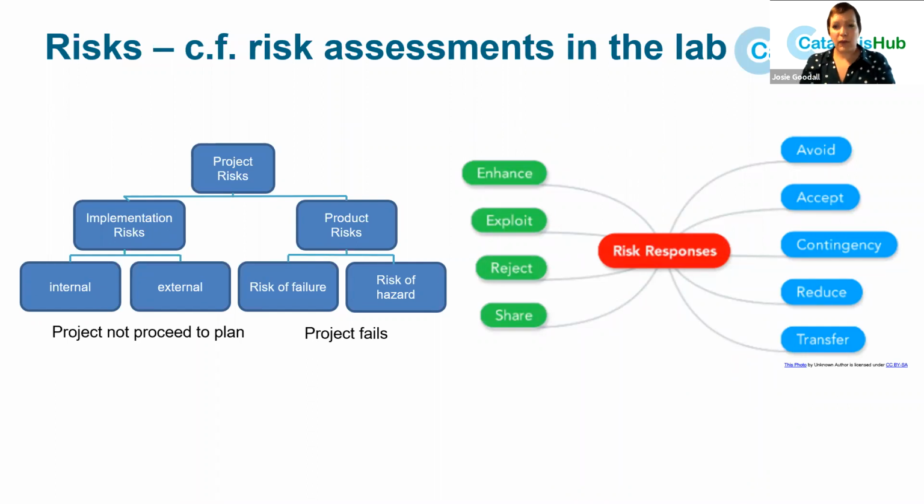Now, I think most of the people who had registered were scientists or work with scientists. And so we're probably very aware of the process of managing risks. We all write risk assessments for our experiments. And for a project, it's no different. You're effectively doing a risk assessment for the project. You are looking at what can harm the project, what hazards there are to the project, what that impact might be, how severe and how likely. Risks generally arise either from the doing of the project or the product that you are creating.